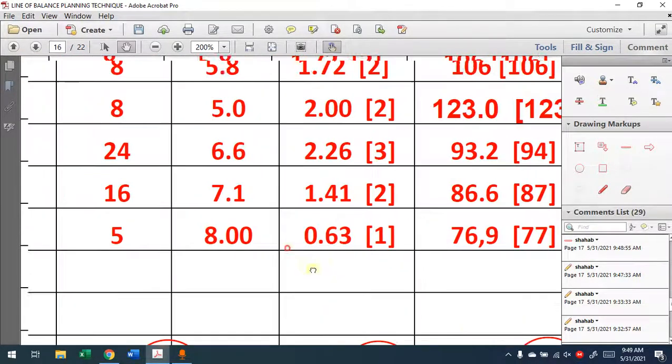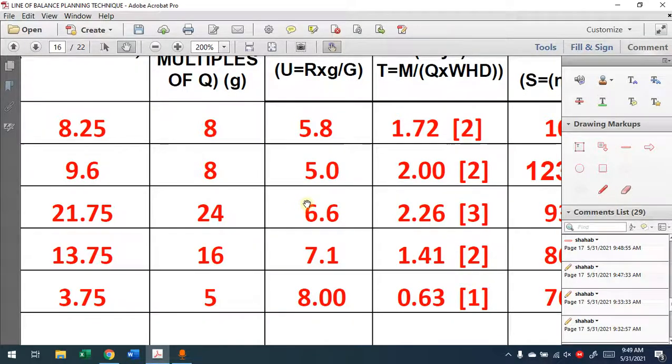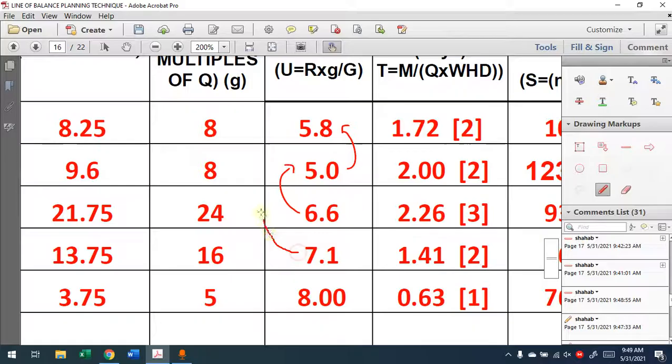Look at here. I told you that if you just check the natural rate, you know whether you have to add the buffer to the top or to the bottom. 5 and 8: 5 is smaller than this one, yes? We remember, please, all of them are depending on each other. You cannot follow this one unless you check the dependence. This depends on this one, like you just did the line. Maybe you have this one depend on this one. So first, just have this in the table to see which activity depends on which activity. Then you can decide whether to start from the top or from the bottom.